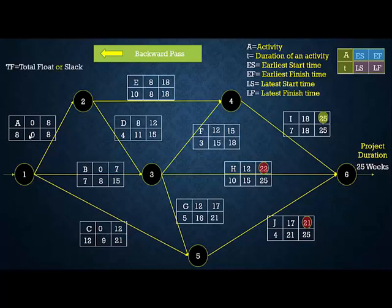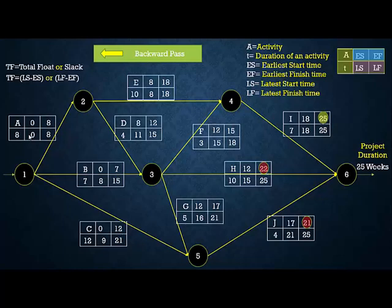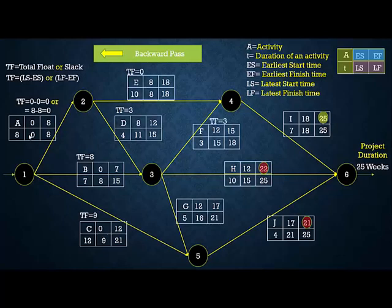Total float (or slack) is calculated as: Latest Start − Earliest Start, or equivalently Latest Finish − Earliest Finish. For activity A: 0 − 0 = 0. For activity B: 8 − 0 = 8. For activity D: 11 − 8 = 3. We calculate the total float for all activities similarly.